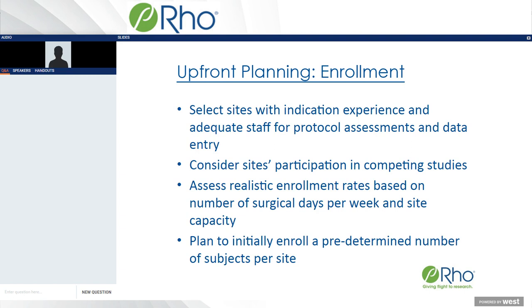This is very easy to achieve if you plan for it ahead. Sites don't have to stop enrollment. They can actually schedule their surgery so that they're having a couple during that first week, and then schedule the remainder of what they fully plan to enroll moving forward. And it actually helps a lot to be able to step in, take a breather, ensure quality, and make sure that the sites get their questions answered as well.